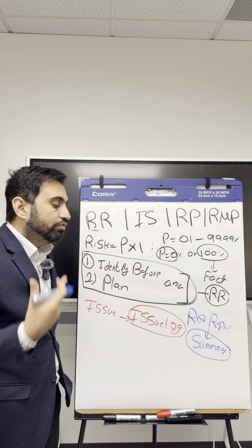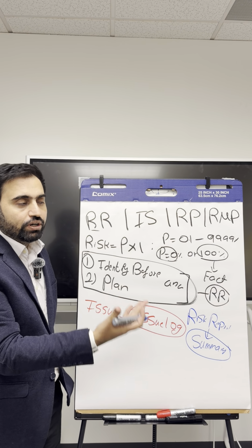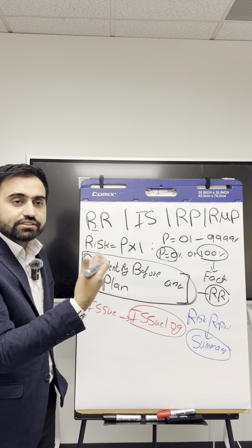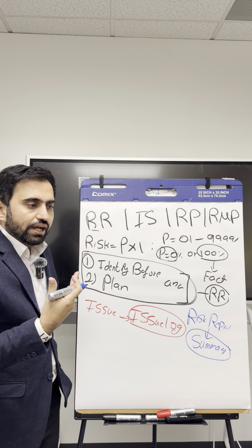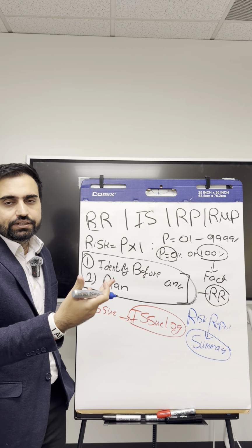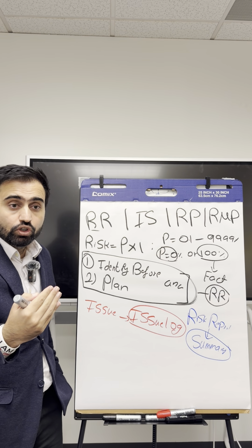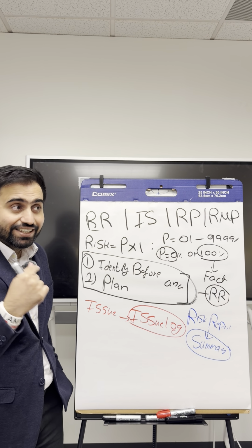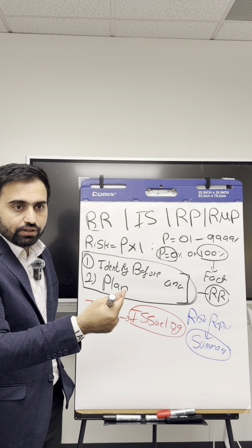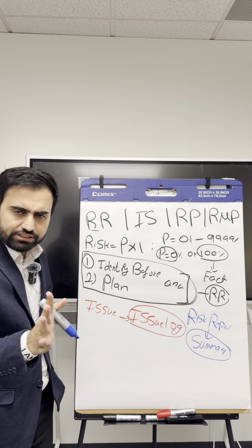As a result of the weekly or bi-weekly meeting, you share the status: what has happened in the last 2 weeks, what can happen in the next 2 weeks. That weekly or monthly meeting shows the exposure of the entire risk. That is the risk report. The risk report will have those risks which have happened in the last 2 weeks and which can happen in the next, and maybe the overall exposure of that. So it is more of a status meeting. I hope that makes sense to you.